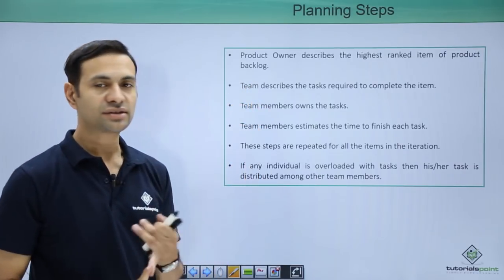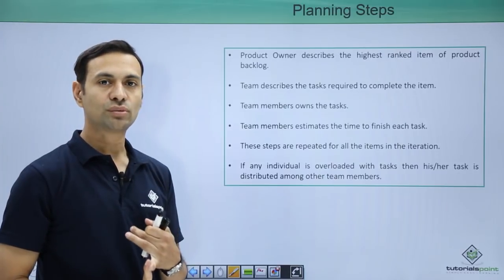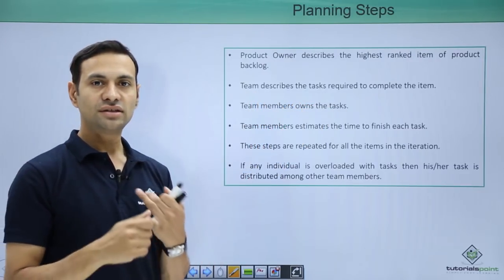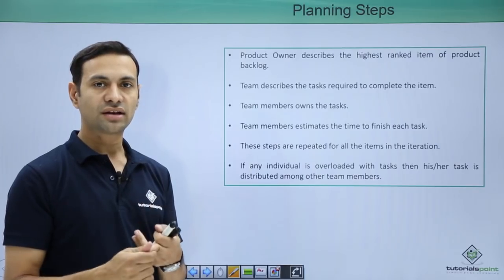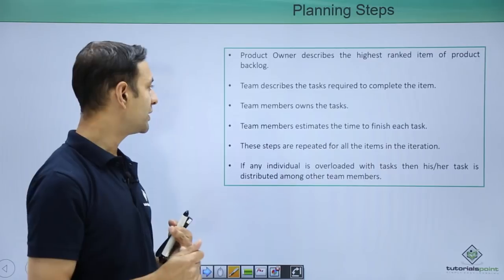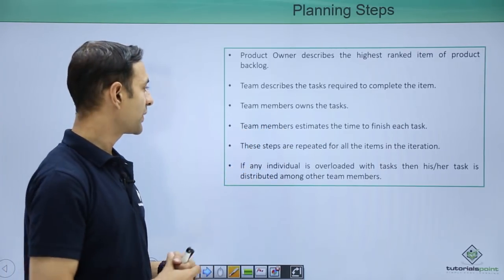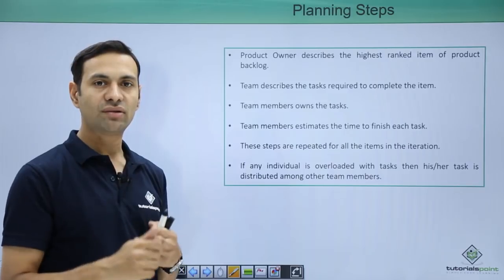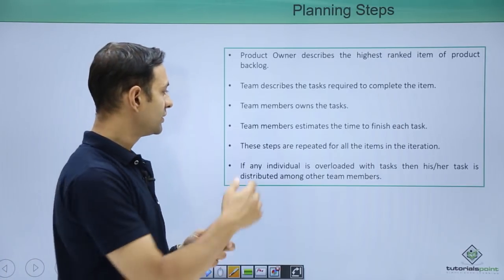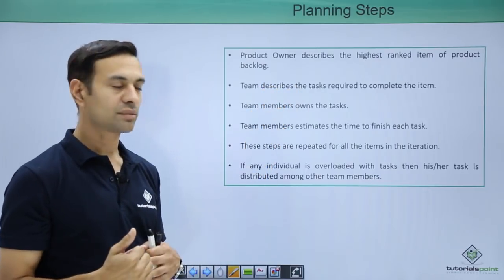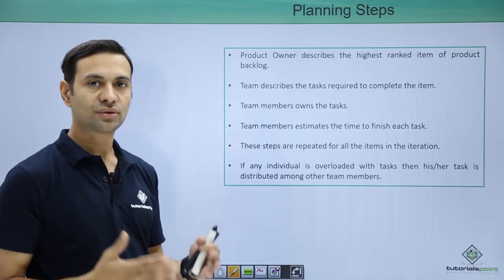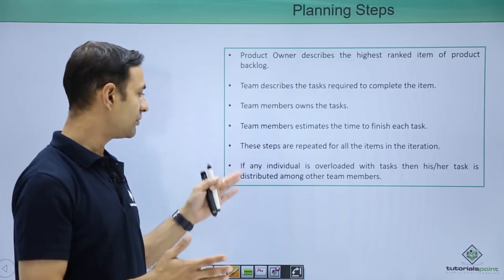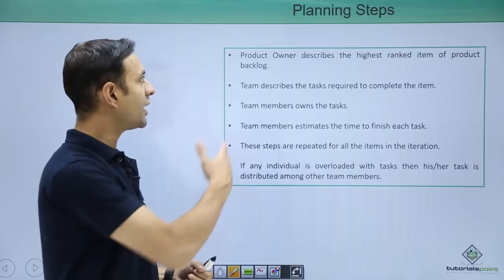Planning steps: the product owner first describes the highest-ranked item of the product backlog. The team then describes the tasks, dependencies, and technical feasibility of the user story. Team members own these tasks and estimate the time to finish each one. Once a feature is done, the next feature is taken up and these steps are repeated for every item in the iteration. If any individual is overloaded with tasks, the tasks are distributed among other team members.